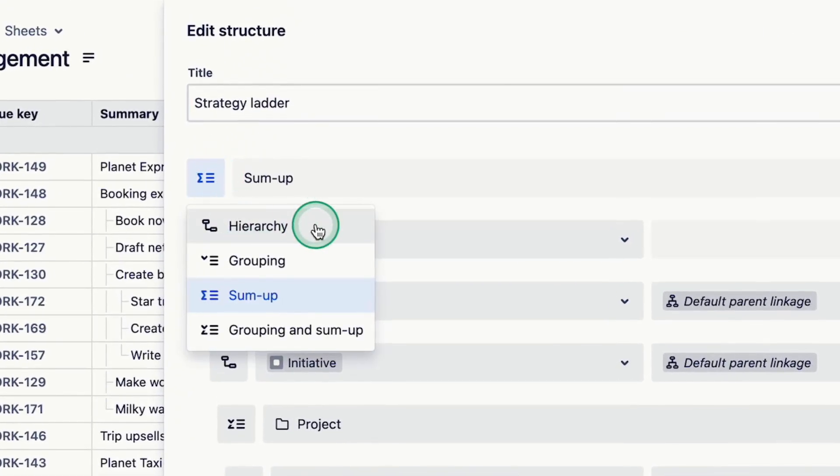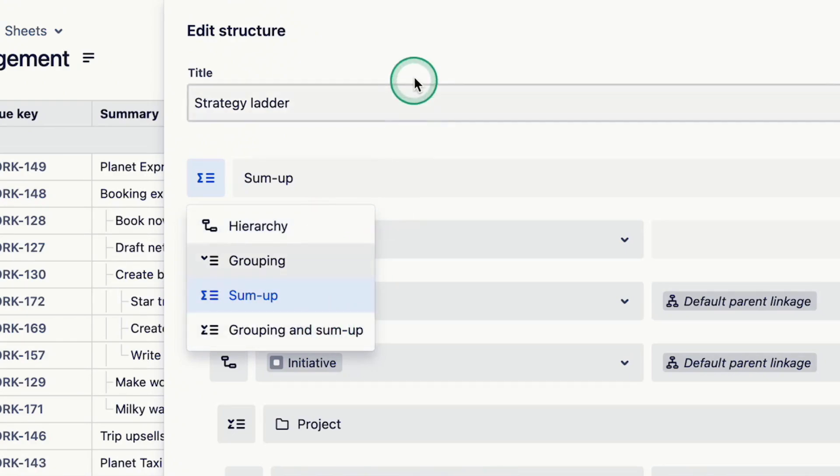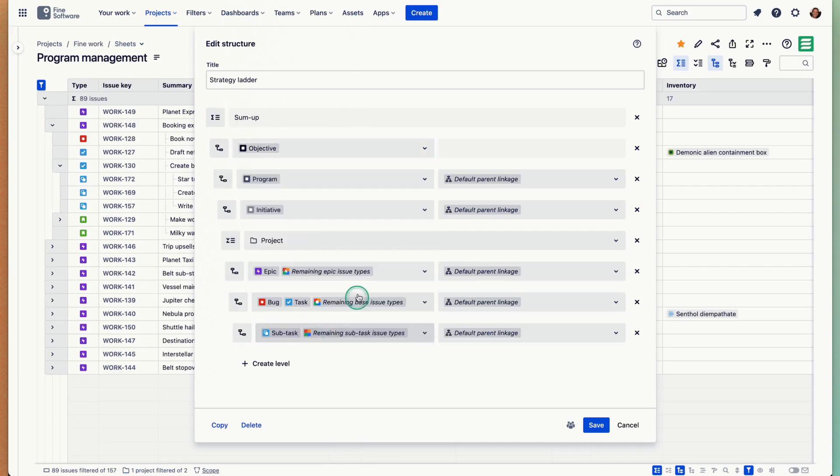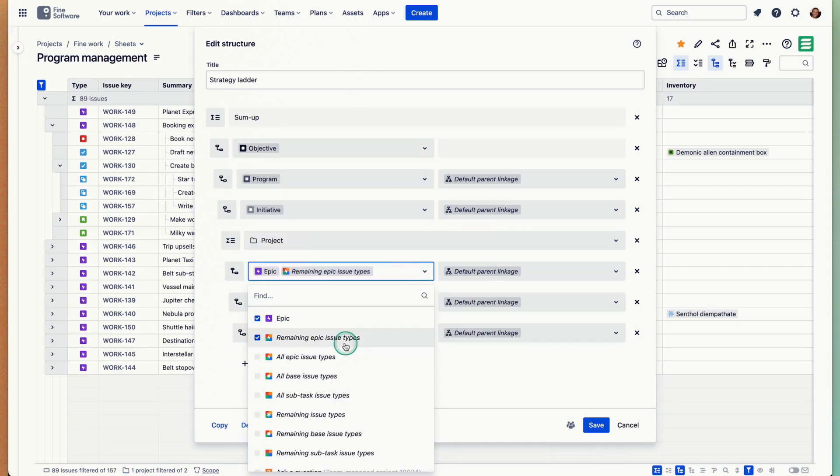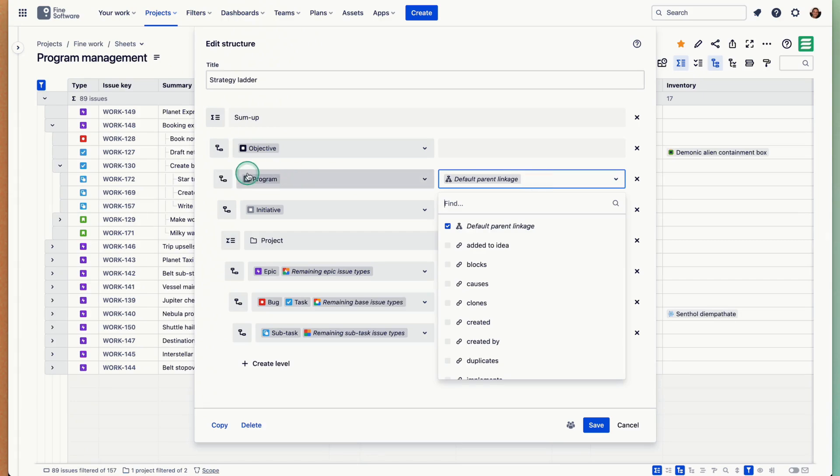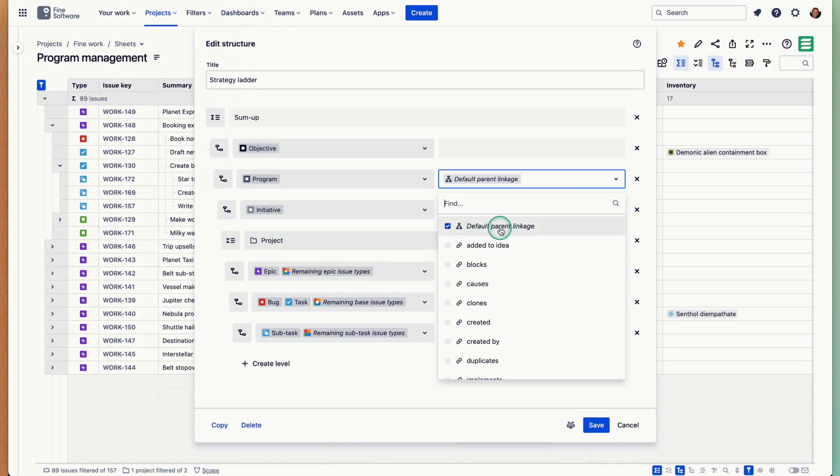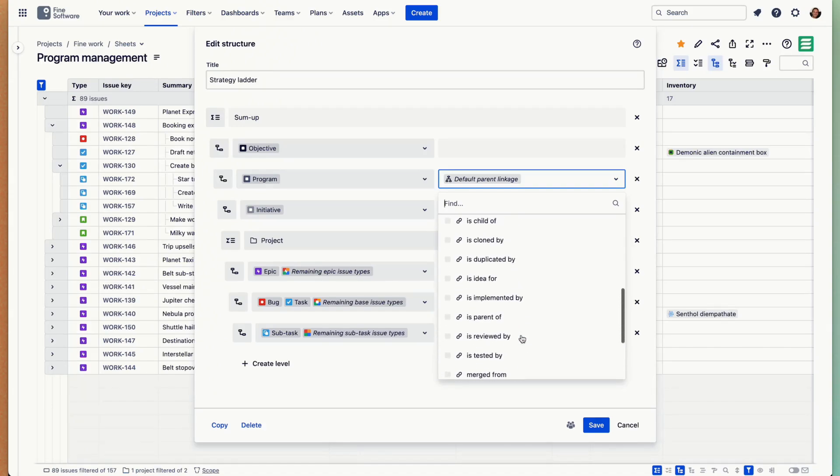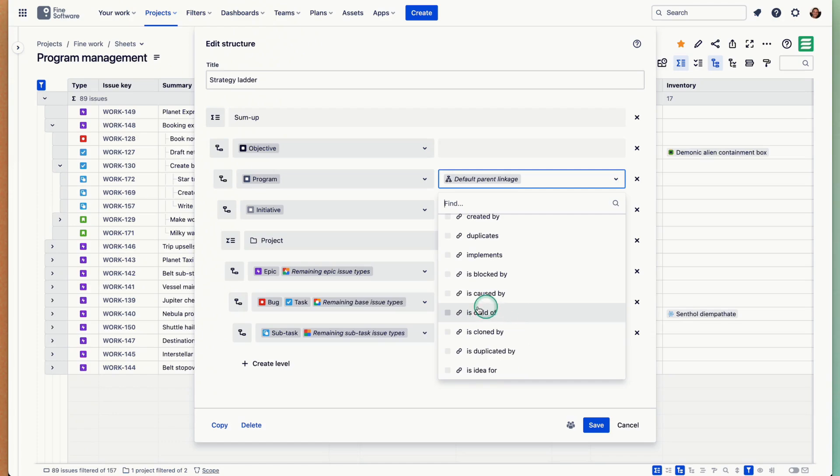There are levels here. The structure has a title of course. A level can at this point be either a hierarchy level, grouping, sum up, or grouping with a sum up. A hierarchy level is where you pick first an issue type or multiple, or like here wildcards for an entire issue type level. Then you define how this hierarchy level, the issues on this level, are relating to their parent. Either that's by the parent or parent link or epic link field, the default fields in Jira, or it can be issue link descriptions from issue linking.